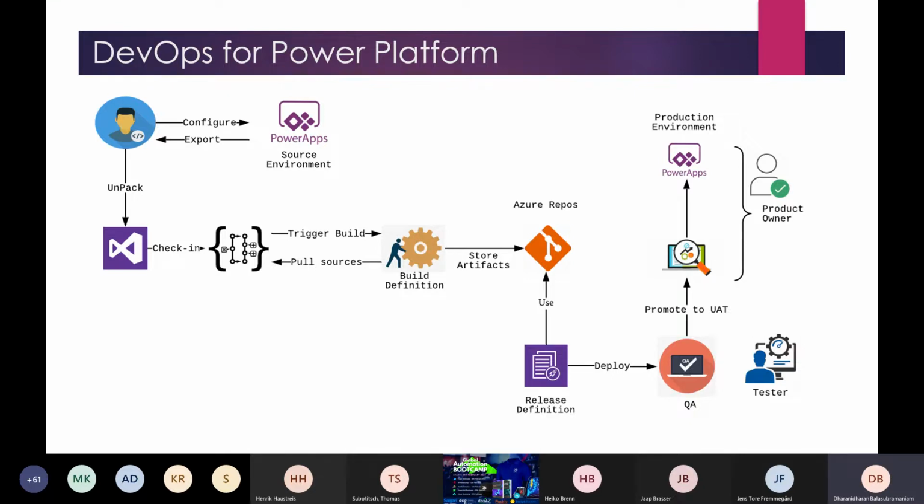As part of our process, whenever a user story is assigned to the developer, they pick up the user story and come up with a solution, and they present that solution to the SDA, the Solution Design Authority, who will finalize the solution for that particular user story. The developer presents it to them and they approve it.